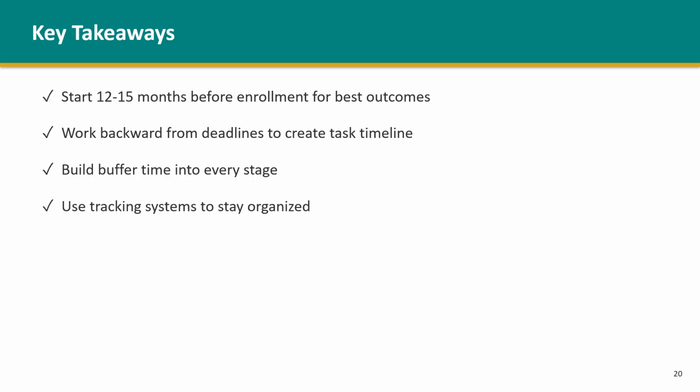Build buffer time into every stage. Things go wrong. Recommenders delay. Life intervenes. Timelines with no slack break under pressure. Buffer provides resilience. Use tracking systems to stay organized across multiple programs, components, and deadlines. Spreadsheets, calendars, reminders, and progress tracking keep everything visible and manageable.